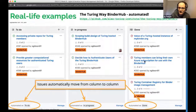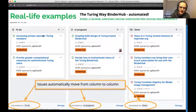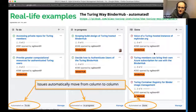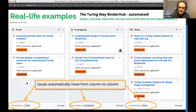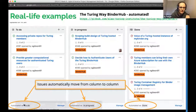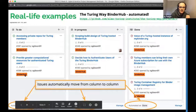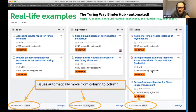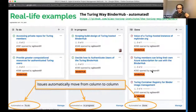Another example is the BinderHub board for the Turing Way. Rather than releases, it has a flow where tasks move through columns: to do on the left, currently in progress in the middle, and done on the right. What's really nice is that GitHub will automatically move tasks through the board based on your actions — tasks you begin work on automatically move to in progress, and when you close a task it automatically moves to done. This gives you a transparent roadmap that isn't much admin work because a lot of it is automated.